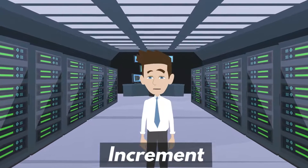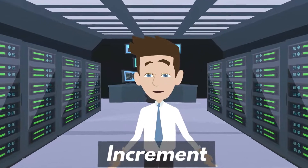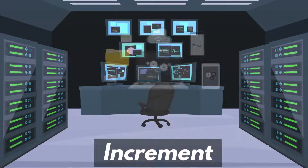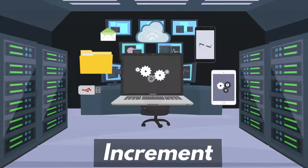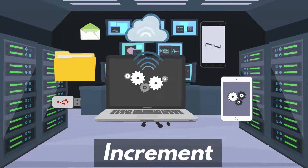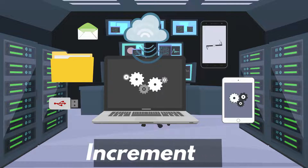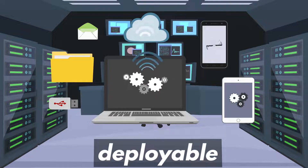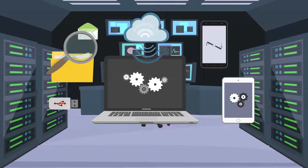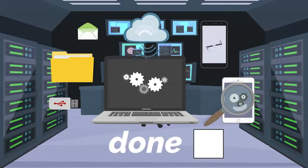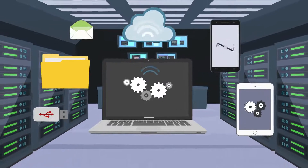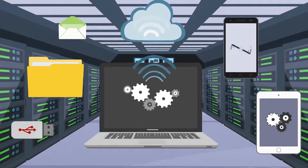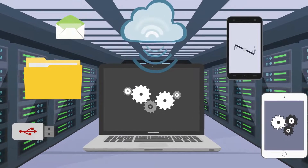The last artifact is the Increment. The Increment is the thing that is actually delivered. For example, it might be a new release of the software with all the new features that were completed in the sprint. This increment should be something that is potentially shippable or deployable. This means it needs to fully meet the definition of done, with all the proper testing and cleanup that would be necessary to start getting a return on investment from it.